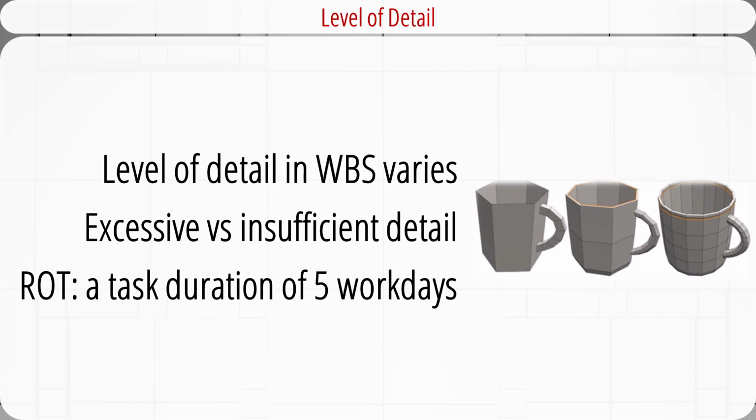Suppose the time estimate of a task is 40 workdays. It may be better to divide the task into 7 or 8 smaller tasks for control purposes. This is because if one of the smaller tasks gets behind because of problems or a poor time estimate, it will be possible to take corrective actions quickly and avoid delaying other following tasks in the project. If the single task of 40 workdays is used, it is possible that no corrective actions would be taken until day 40.